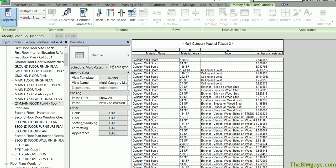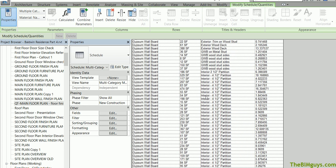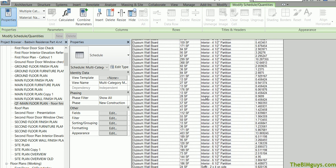Now the real trick is your project has to be right. You can't, at this point in time, you have to make sure you're putting good information in so Revit can pull good information out. You may have to do a couple of projects. Talk to the general contractor. Talk to the subs and see how close you were on those numbers. And you can slowly adjust this factor.